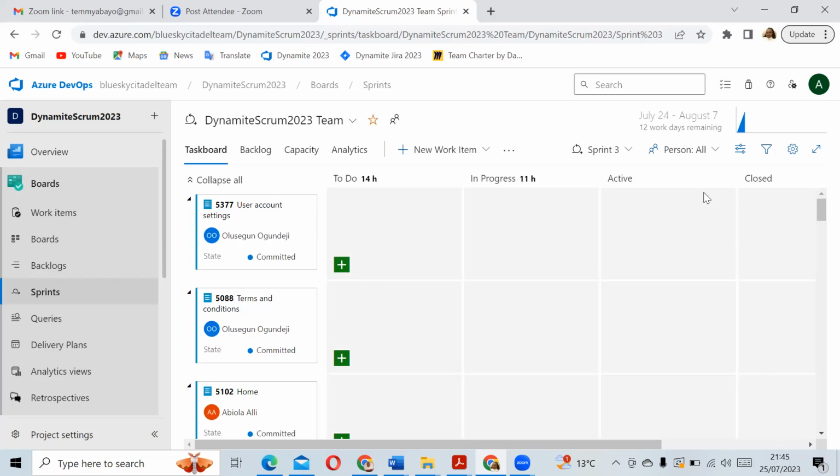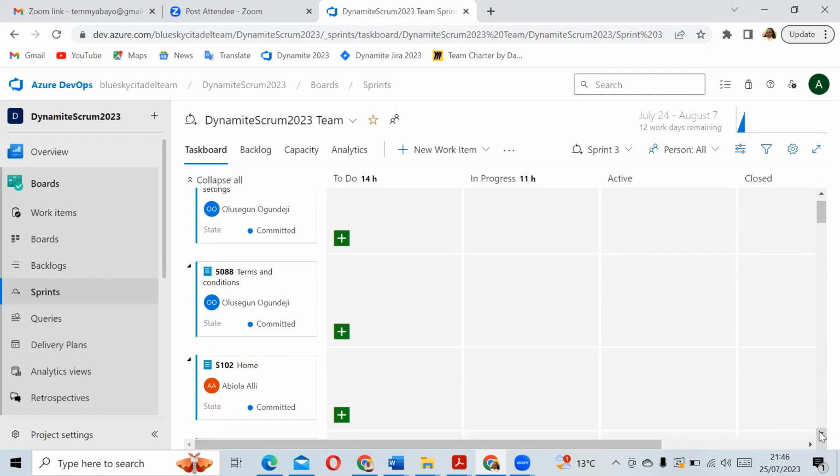So once you create it, is it that your critical ones are resolved during the sprint? Your high ones, you want to resolve during the sprint. Your medium, you want it to go into the next sprint. Your low severity, you want them to go into the backlog.